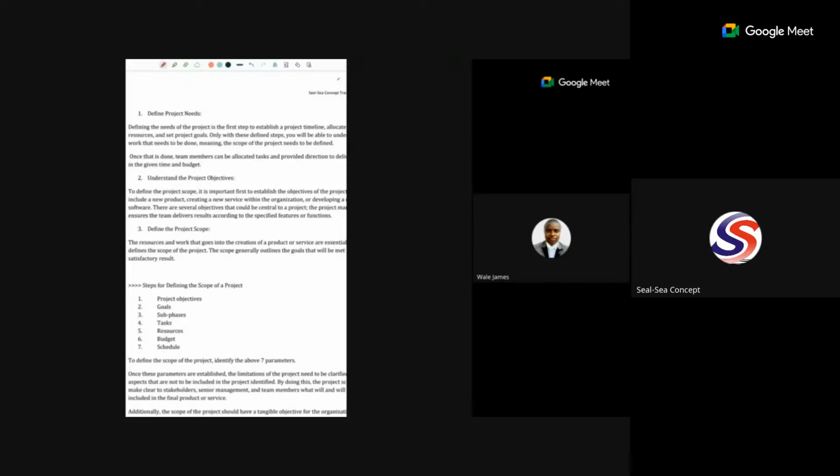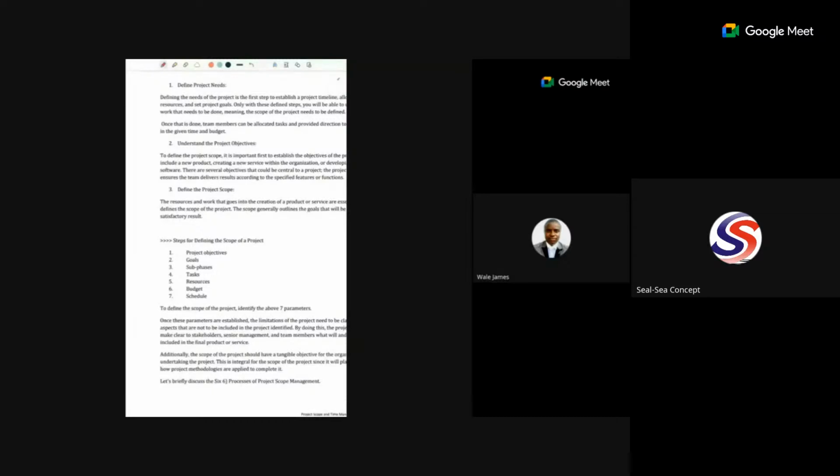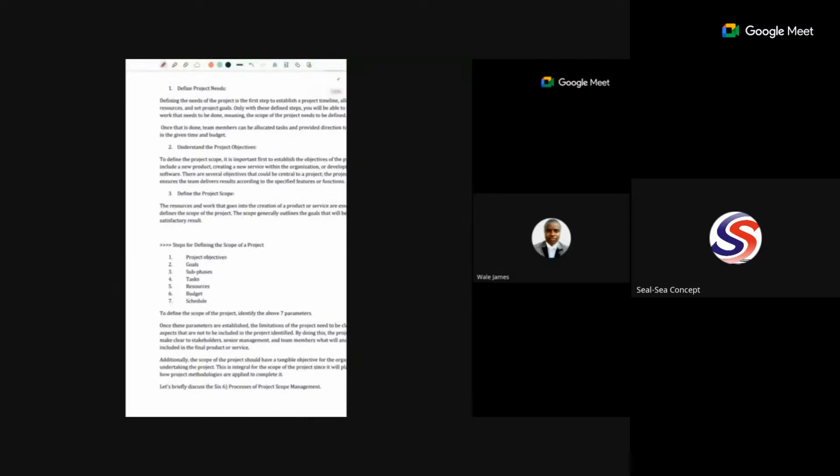This will actually help you to know how enormous or how big the project that you're handling is. If somebody is expecting 500 people in his event, and you went ahead to get a hall of 200 capacity, you have failed on that project. If the event will be a 5-day event, and you have only booked the hall for 3 days, you have already failed on that project.